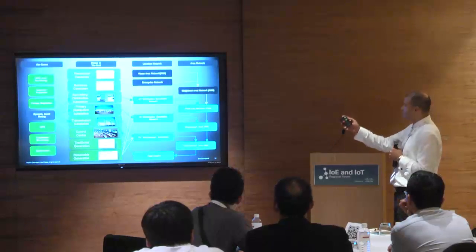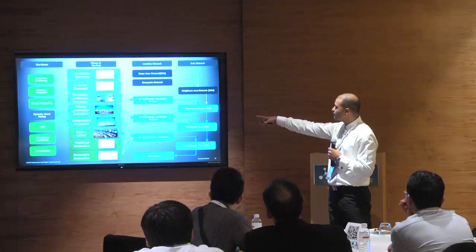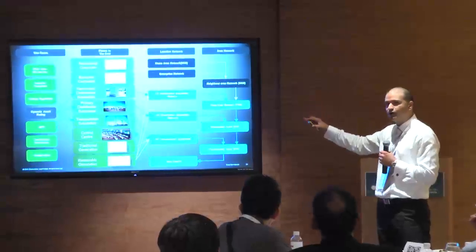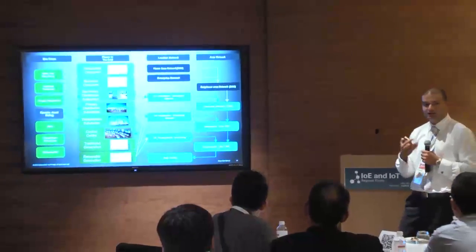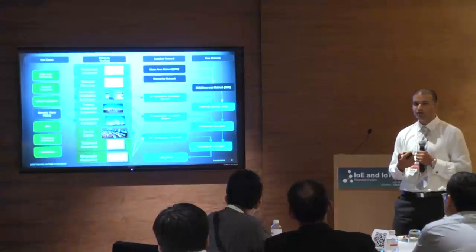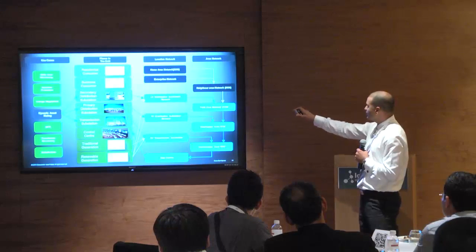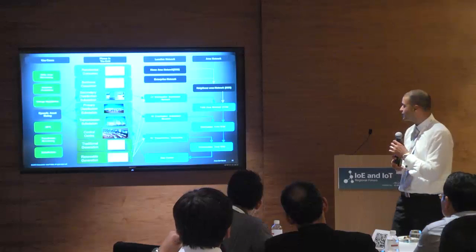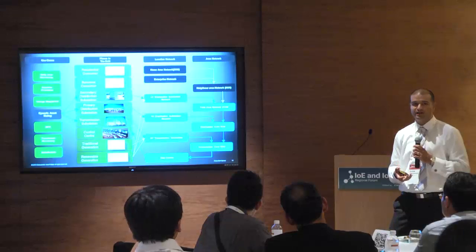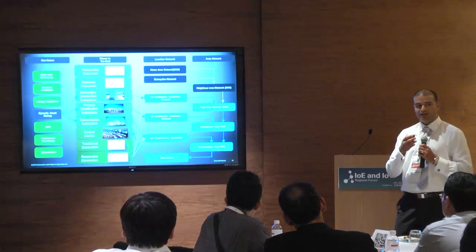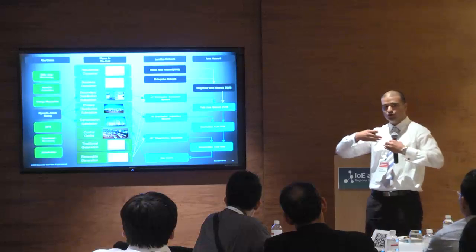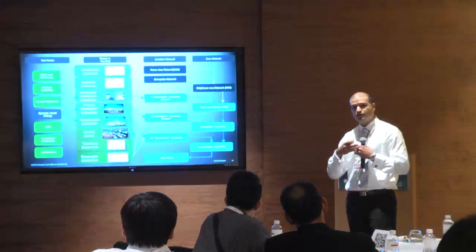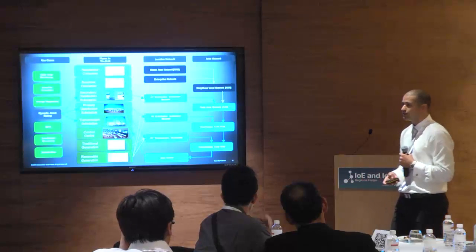So as you can see here as an example, if we take the dynamic asset rating use case, what we're doing is we're mapping those individual use cases to a place in the network, understanding how it overlays with the electrical network in particular, and utility customers typically understand their own utility infrastructure. From there, we can obviously highlight which substations or which physical locations are going to be impacted by a given use case, and we can map that into the technology domain, which is the area network solutions. How do you move from the use case through the physical electrical infrastructure, to the physical location and environment, to the technology domain, is the translation that needs to take place for each of those use cases.